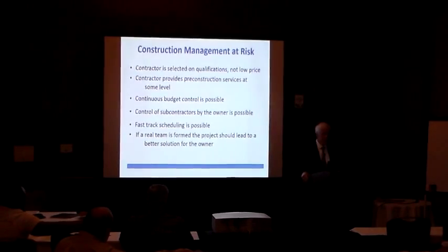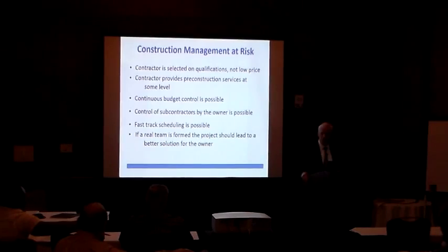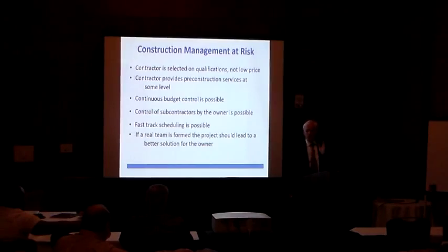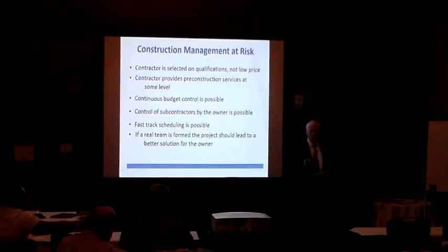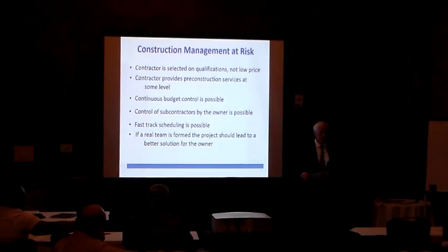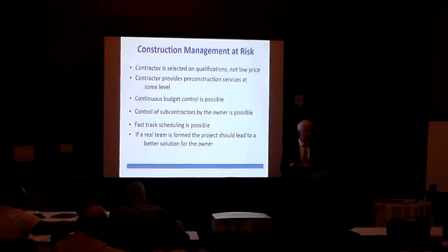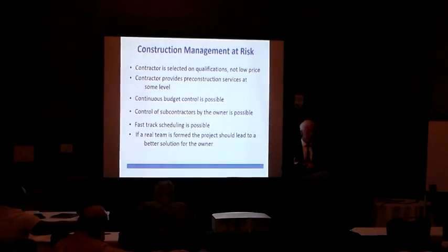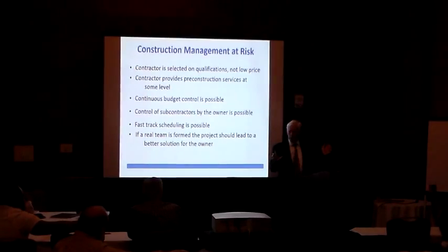The contractor provides pre-construction services at some level. This is important because as we have moved into the idea over the last, say, 10 years of construction management, precisely what pre-construction services means is not very well defined. And so to one contractor, it might mean I'm going to give you a budget at SD. I might give you one at CD. I'll give you something, and you don't know what something means. I mean, did he take out a means book and do something right quick or what?